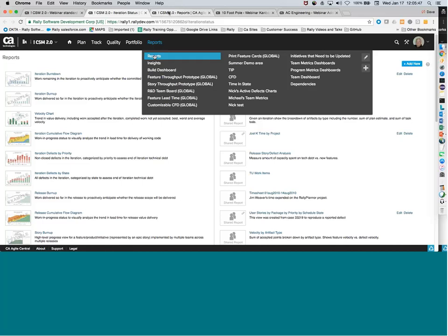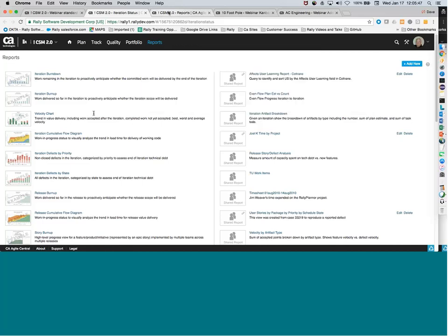The other thing to remember is it's really important to make sure you're doing the updates to the work daily. As we're reporting, if you're not getting those in there, then we're going to see these erratic swings in completion and hours. So have your teams consistently update their information and make sure they're current with that.